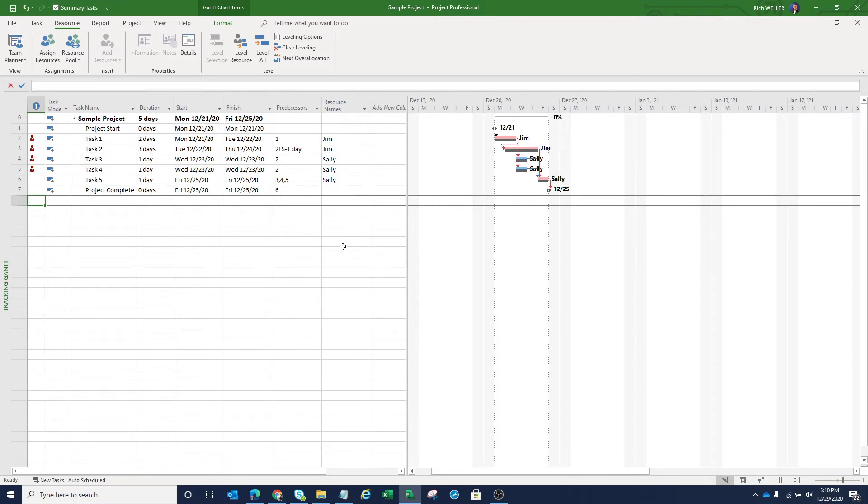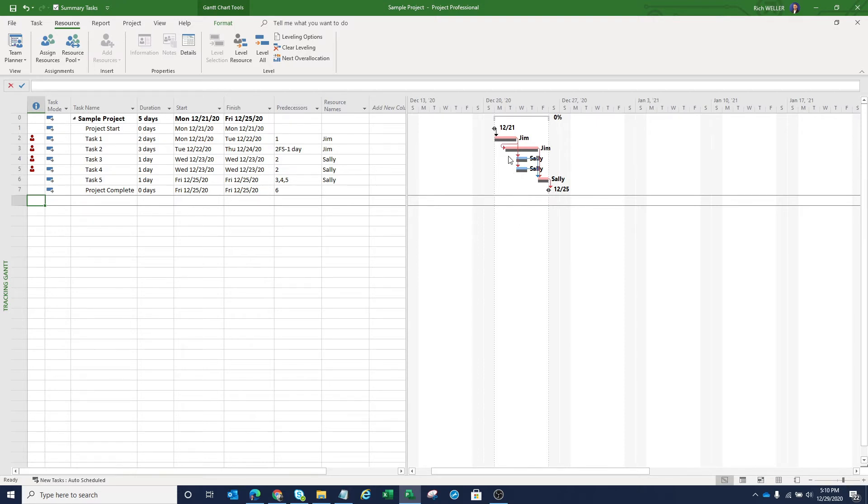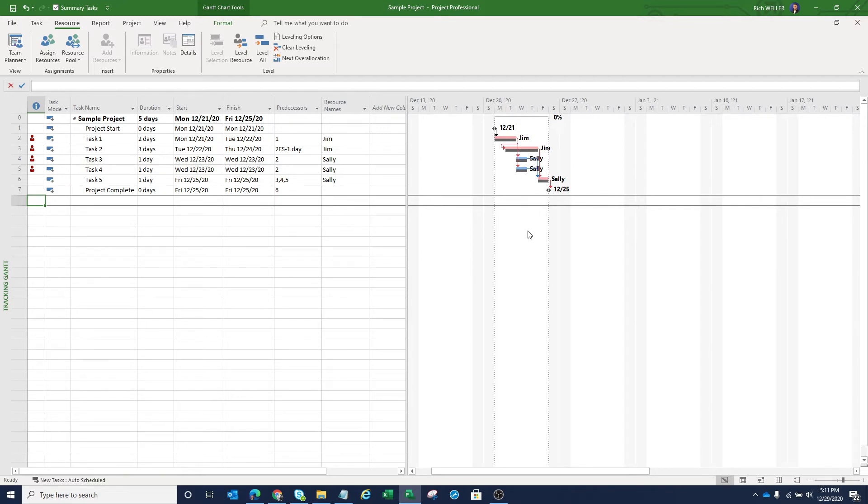The reason that I come here is because within the tracking Gantt view, by default, I'm able to see some additional things on the bar chart on the right that are not there in the Gantt chart view. As I'm looking at the bar chart on the right here, I can see the dark bars here on the bottom. That indicates the baseline duration. This project schedule has been baselined. I can also see from the tasks that are in red, these tasks are currently on the critical path.